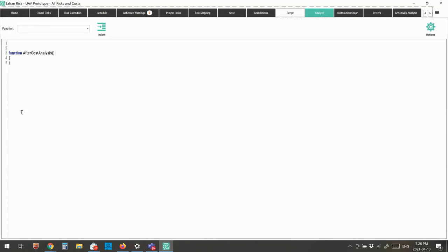So there was an option to say, okay, if we get more than 70% done, we'll ship the thing down the canal before it freezes and we'll complete it in transit. We'll basically put a work crew on there and they'll keep working and living on the thing while it gets shipped up the canal. So if we're more than 70% done, we can still ship, but if we're less than 70% done, we can't. Those are the kind of things you can build into the model. Again, very advanced user stuff, but they've built that into the tool so you can build some very sophisticated models.